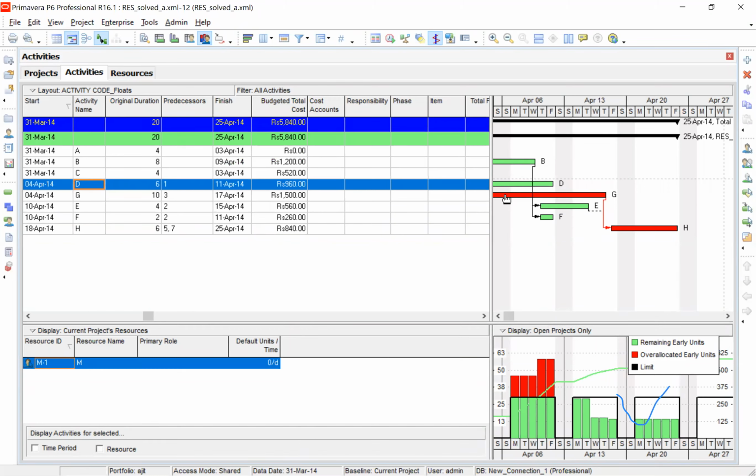Please note down whatever I have explained in this example. In the notes that I have given in that resource bar chart, I have provided these steps. But we add one step, that before adding resources, you try this setting, which is total float and late start.